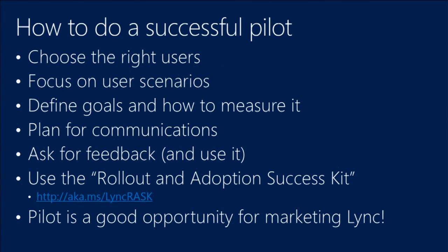In order to say at the end of the pilot if it was successful or not, well, you need to have some goals, and you need to know how to measure that. So it could be that you want to have a specific number of calls used on Link versus the number of calls they use on their traditional phone. It could be that you ask your users on a regular basis, how much do you like Link? How much did it help you? How much did it improve your working day?